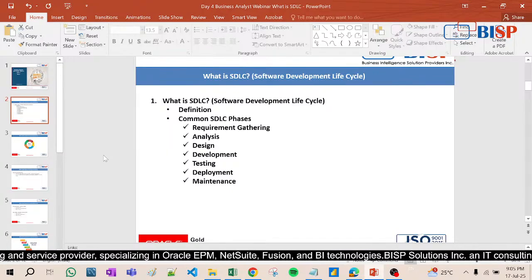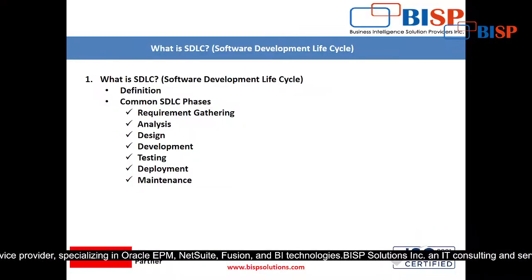Now we don't know anything about that particular college, right? So what we will do, the very first step is requirement gathering. Requirement gathering means asking the stakeholders. We know stakeholder means every person involved in that project from the client side, and also from the technical team side. We will ask the client exactly what your requirement is, what is your main target, what's the problem, what is the scenario, and everything is captured in the BRD.